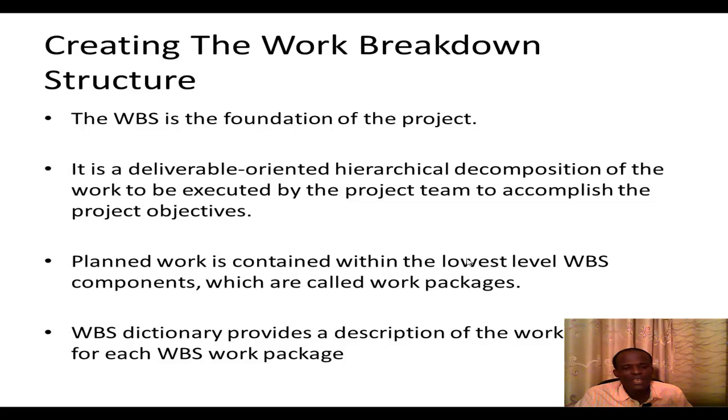Now, planned work is contained within the lowest WBS components, which are called the work packages. So if you look at the hierarchy of the WBS, which is like an inverted tree, the lowest level WBS components are what we call the work packages. Now again, we have what we call the WBS dictionary that provides a description of the work to be done for each WBS work package.